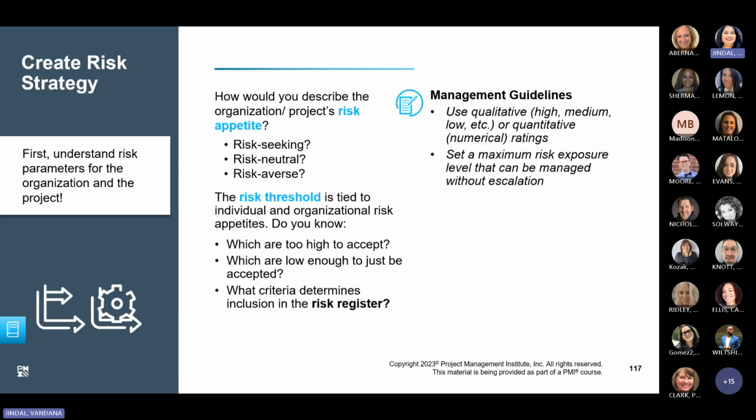Risk threshold is a specific point at which risk becomes unacceptable. So if risk crosses this point, action is required. Relating it to the same example, the tech startup might have a risk threshold associated with its burn rate. If its burn rate exceeds a certain level without a corresponding increase in revenue, that's a risk, and they have crossed their risk threshold, and the company needs to take action to reduce their costs or increase their income. These are all broad concepts, and the specifics will vary greatly depending on the nature of the business, industry, size, their strategies, and many other factors.